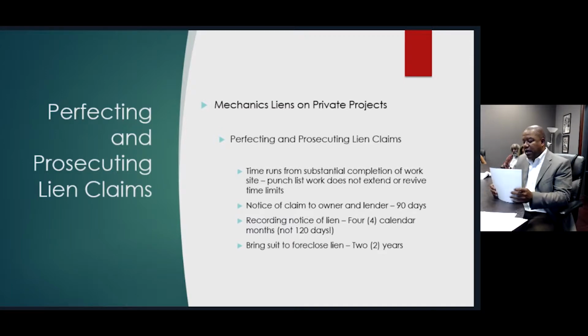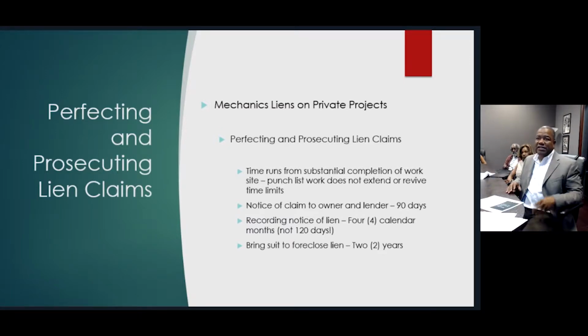Now, perfecting and prosecuting lien claims. We're getting into the part of the presentation where I want to point out that we've got to keep track of our calendar and those key things that are indicated on a calendar because they have deadlines associated with the Mechanics Lien Act. You're going to find too, when we talk about the public funds, that there are different timelines associated with the Mechanics Lien Act as it relates to both the private and public jobs. You should have somebody in your shop that is maintaining a calendar and tracking these dates, because if you miss any of these dates, you've missed your opportunity to claim monies under this act.